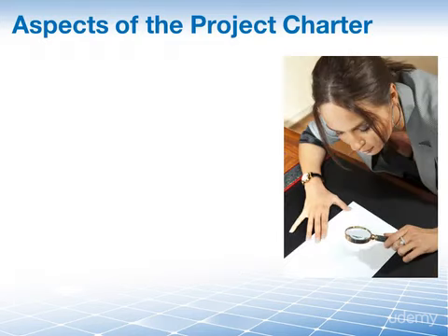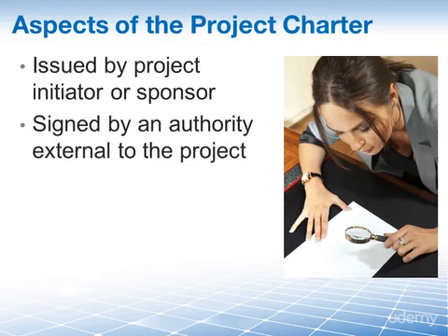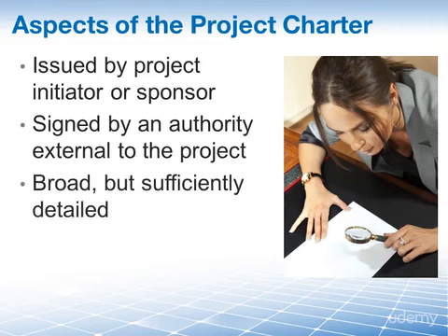The project charter should be issued by the project initiator or sponsor. Well, theoretically that is. More often than not, this task is delegated down to you, down to me, the project manager. We create the charter for the stakeholders because we have the experience in what a good charter should contain, and they most often don't. It is then signed by someone who is vested with the authority to sign and, most importantly, fund the project, who is external to the project. The project charter should be broad with just sufficient detail to initiate the project. This is because at the time that you're writing this, well, most usually you don't have a lot of detail about the project available yet.